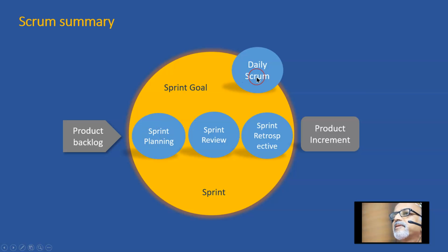And every day there is a daily stand-up meeting where the team members discuss three things: what did I do yesterday, what am I doing today, and what are the challenges I'm facing. This meeting cannot be more than 15 minutes.